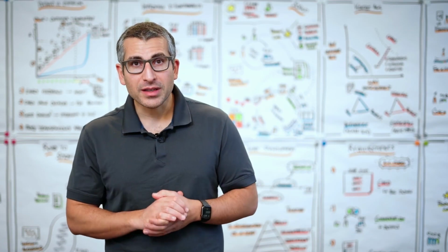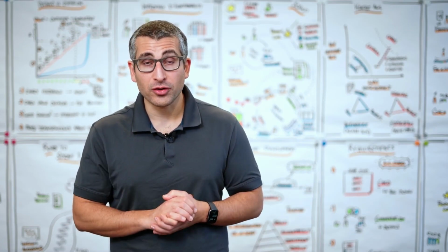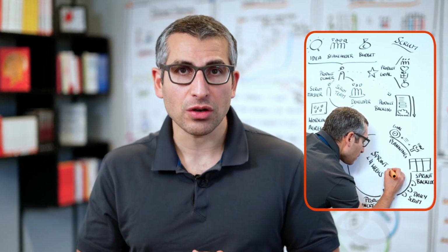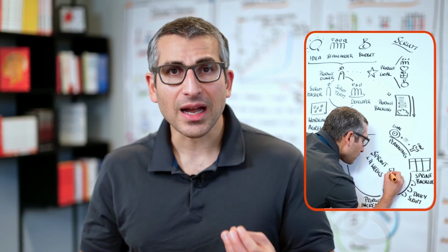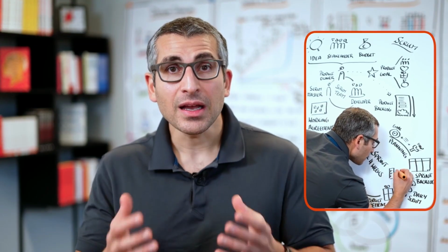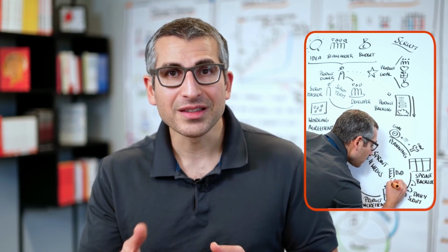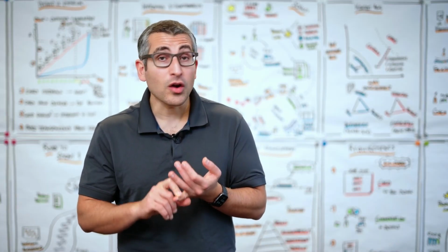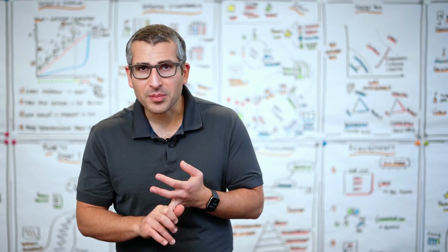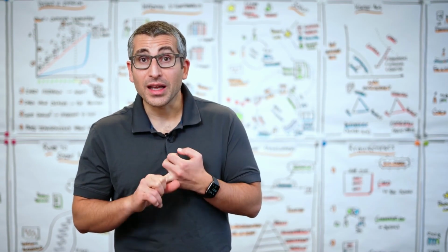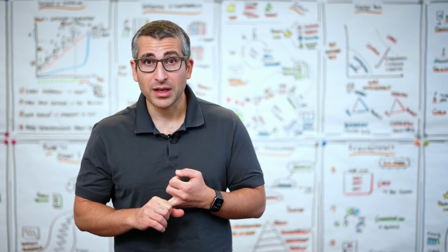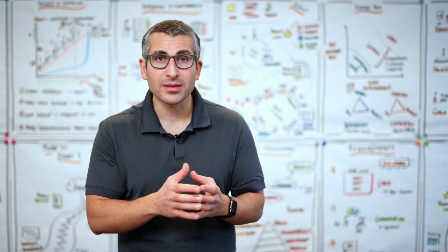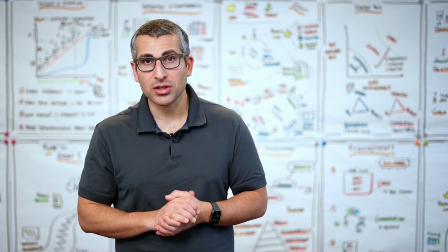At the end of the sprint, a team delivers a product increment. That product increment needs to meet the team's definition of done, which is a specific type of working agreement, basically our shared understanding of what done means. Does it mean that our items are tested? If yes, what kind of tests? Does it mean that our items are documented? If yes, how are they documented? We need to establish a shared understanding, and every product increment needs to meet this definition of done.